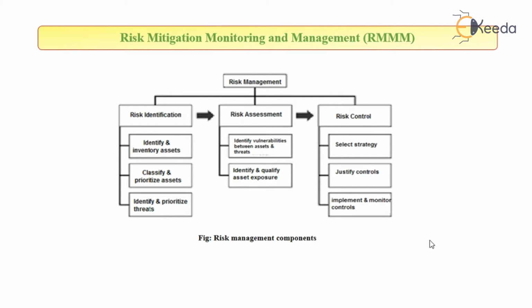Now, let us understand what risk is first. Risk is the likelihood of failure or error. A risk is inevitable. It exists in all factors of software development. But we have to understand what the chances of the risk occurring are and how it will impact the project. What will be the consequence for the project if the risk turns out to be true? If the impact is negligible, then we can neglect the risk. But if it has a critical or catastrophic effect, the risk has to be monitored and managed well.